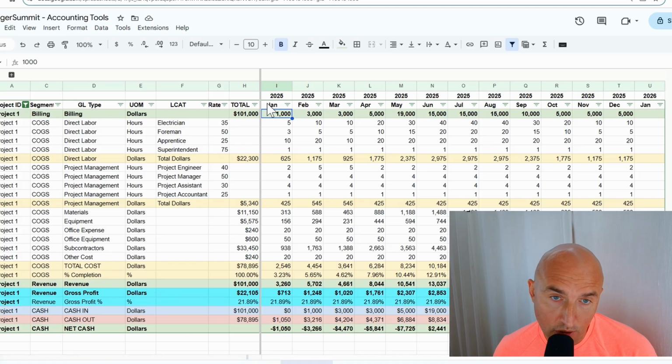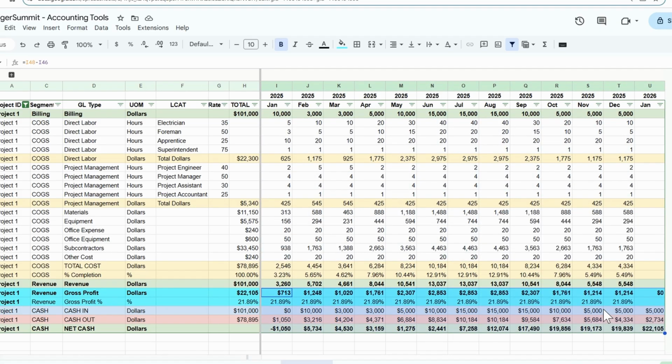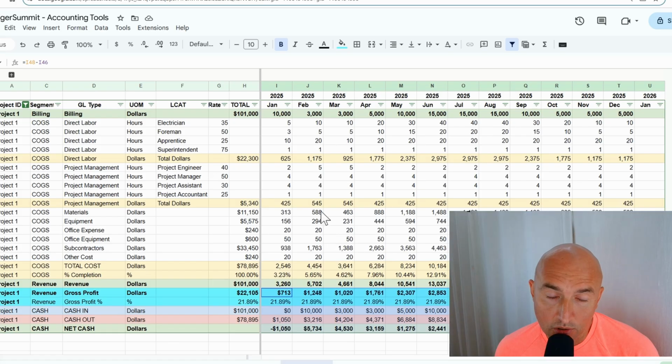So you want your project manager to see if they can bill ahead of time in the beginning of the project versus later. This way, the project maintains a healthy positive cash position. The beauty of this template is that it allows project managers to see the direct correlation between how they forecast the project and what the outcome of that forecast is for the accounting department. And now your project managers can manage the project to achieve the most advantageous situation for the company.